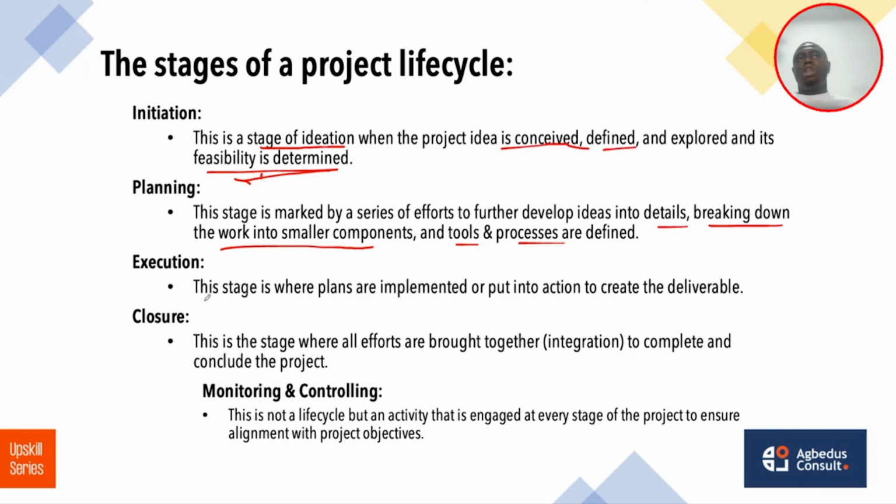And in the execution stage, this is where the project is put into action or implemented, and deliverables are created. Deliverables are key components of a project. So let's say we dig the foundation. That is the first deliverable. Then we start laying the blocks, another deliverable. Then the plumber comes to lay all the pipes. Then the electrician comes to do all the wiring connections. Then the masons come again. So, the different deliverables.